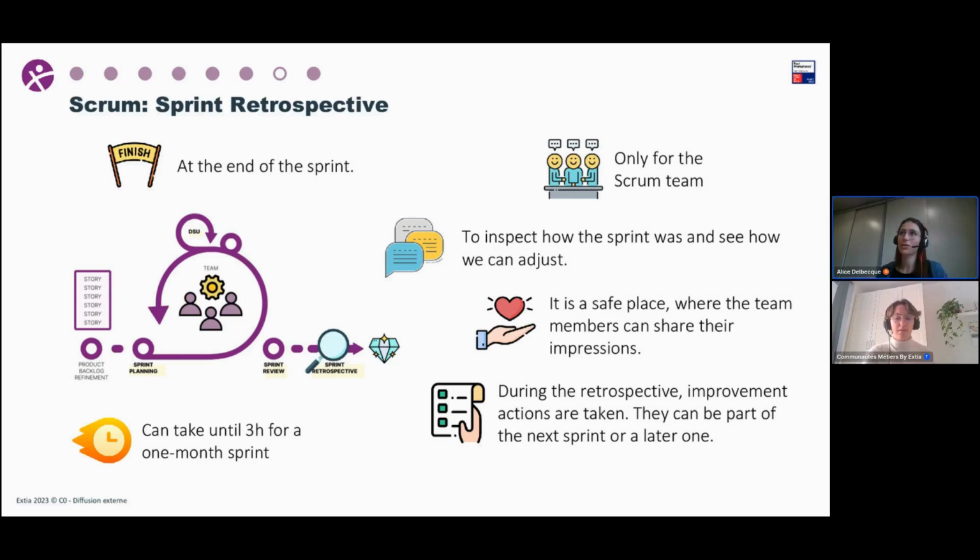And it's not just about playing a game, it's also about taking actions. So in a good retrospective, you also take actions and you will review the action on the next retrospective. It's also important to make sure that the team is still improving and fixing some issue. So in the end, all of that are creating what we call Scrum. So it is important to respect all these kinds of events and to have a good Scrum team in order to make it work properly.